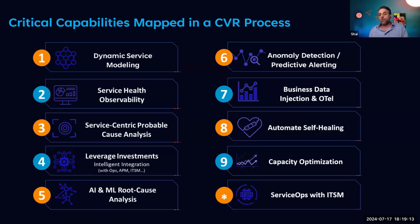It's collaborative value review, which means we wanted to make sure that the roadmap we have in mind, and that we got an approval from the VP Technologies, is actually something that the entire IT agrees with, and it's actually what IT needs in order to provide better services. So in this collaborative value review, we conducted workshops with the customer, presenting the solution on the one hand, but at the same time performing some interviews, collecting data, just making sure that we have the right priorities and we are confident about what needs to be in place in order for the roadmap to actually work.